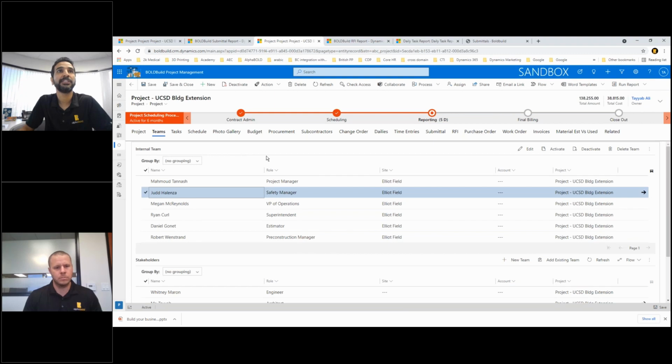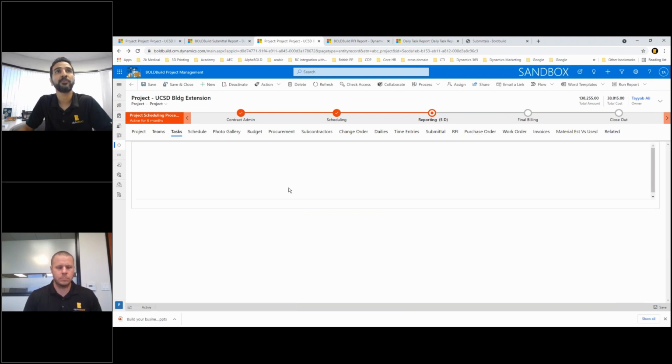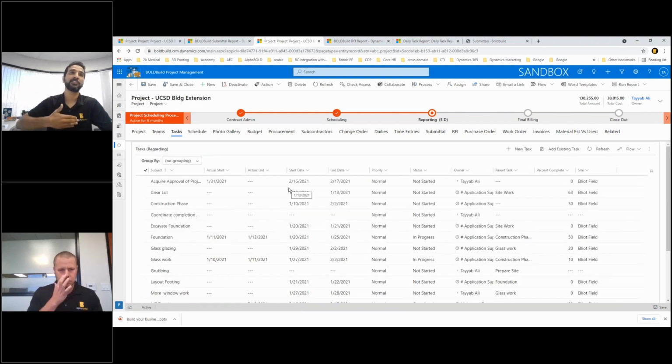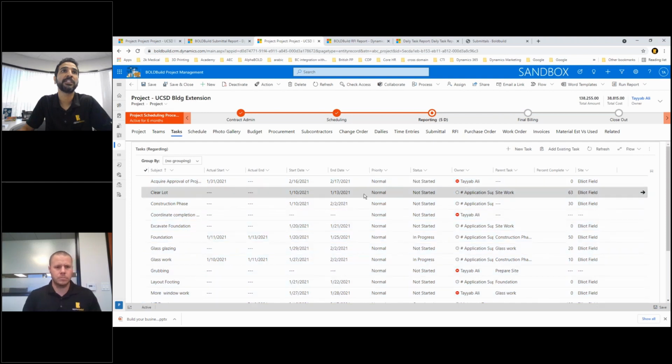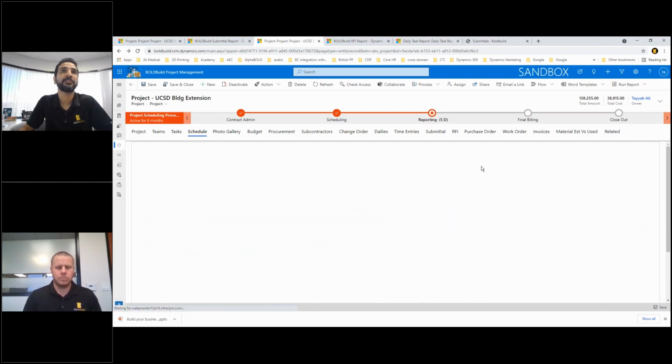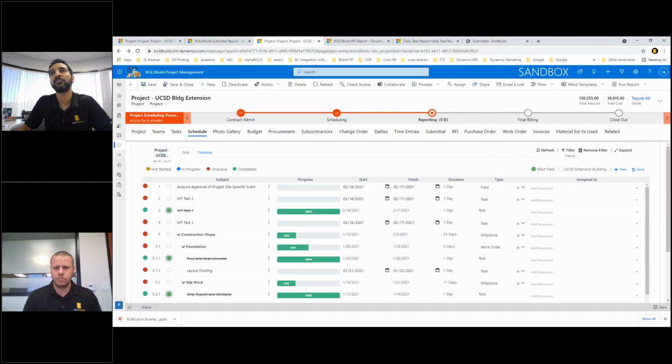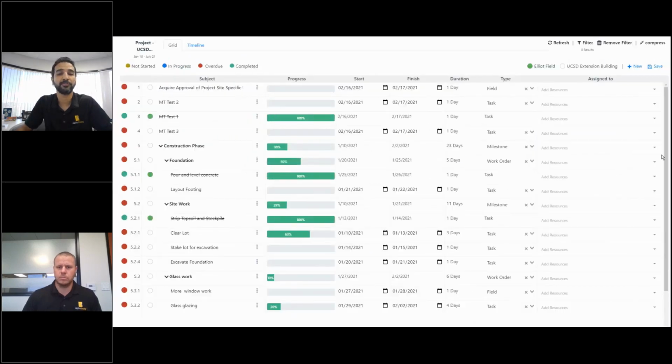And then from the scheduling standpoint, if you want to have your templatized tasks, you can have those, and this is where you can do bulk edits to them. So you can, for example, select all of them, and you can go in here and say edit, and you would set the start date because you wanted to start with the template from a project that happened last year, and you want to push it all up. And once these two operations are done, then we have this very nice looking, easy to use scheduler for you, which allows you to do most of your work in there.